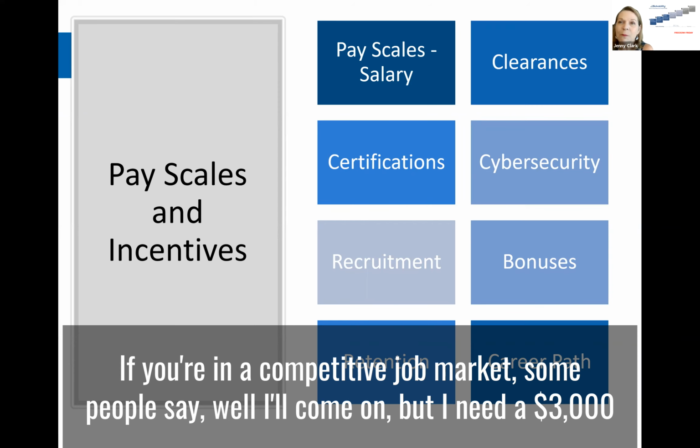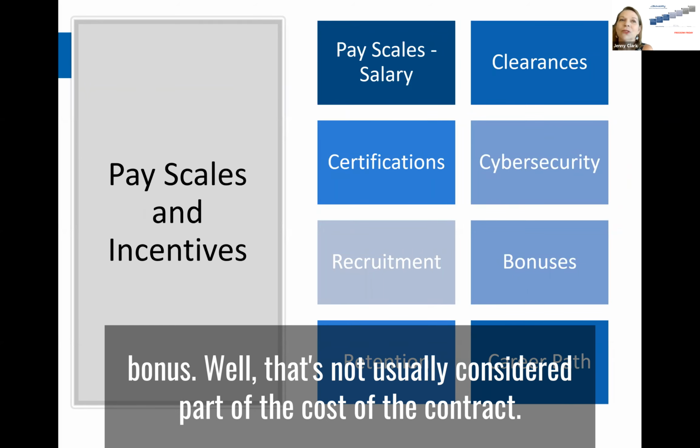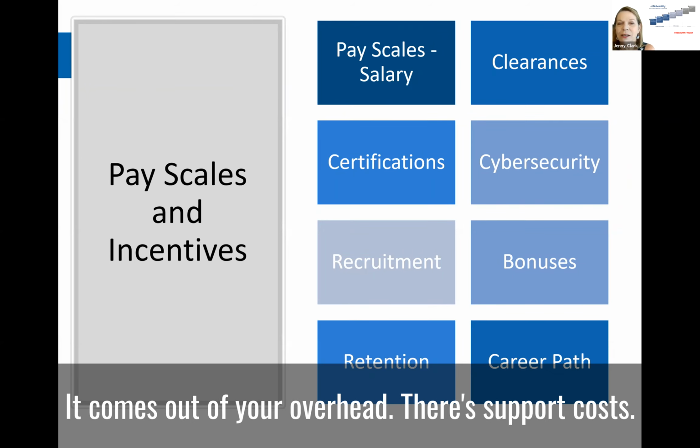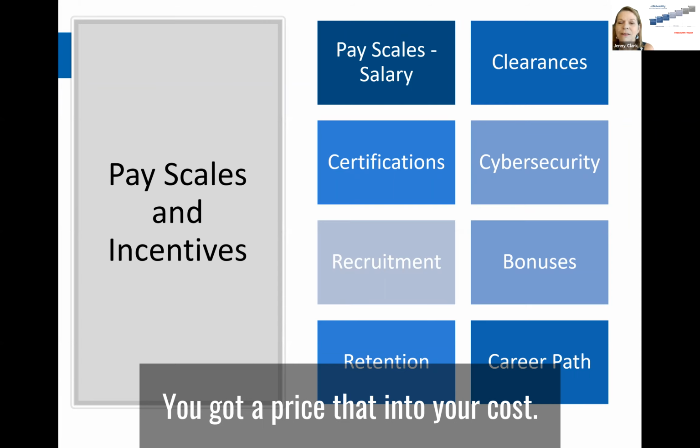Bonuses. If you're in a competitive job market, some people say, well, I'll come on, but I need a $3,000 bonus. Well, that's not usually considered part of the cost of the contract. It comes out of your overhead, the support costs. You've got to price that into your cost.